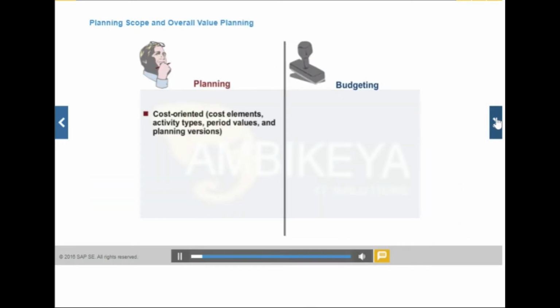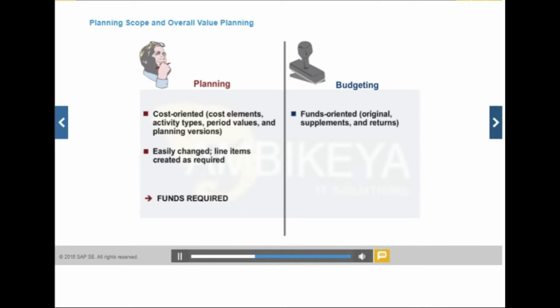During order planning, you enter costs, activities, and business processes that you expect to incur during the life cycle of an order. You can also compare planned and actual costs and carry out differentiated variance analysis. You administrate the approved cost framework for an order or an order group by using budget management.